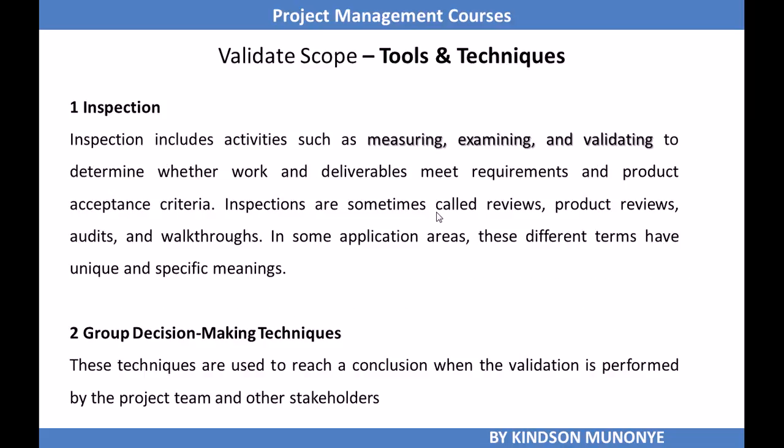Tools and techniques for Validate Scope: inspection is there. It includes activities such as measuring, examining, and validating to determine whether work and deliverables meet requirements and product acceptance criteria. Inspections are sometimes called reviews, audits, and walkthroughs.